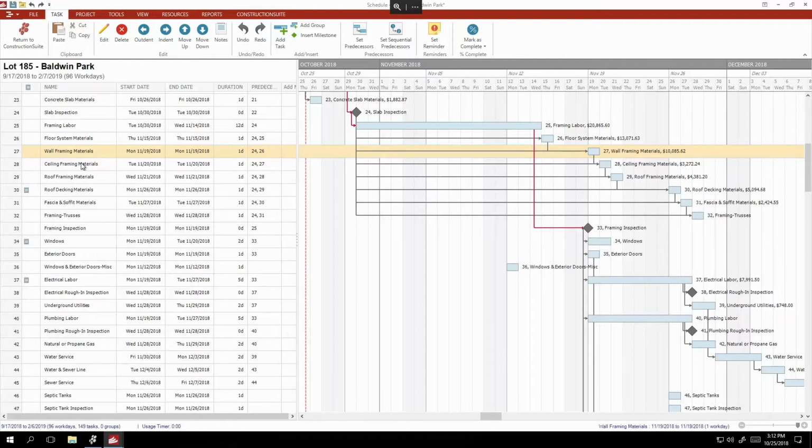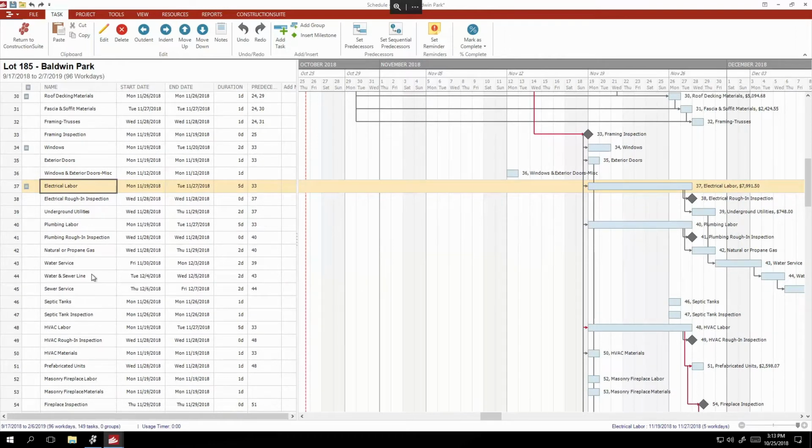I need them in order. That option, this trick that you're providing for us here, which is a treat as well, it gives us that option to scatter those tasks and provide that. I find that it also helps a lot later on when we start to get into the individual trades. We can break down the electrician's work. He's doing lighting one day. The next day, he's going to be on site again, but maybe he's doing outlets. And then the following day, maybe he's doing light switches. Whatever it may be, we can sequence those as well. He's going to be here the whole week or longer, but we can scatter out his tasks so that we can give him some information there to work with.